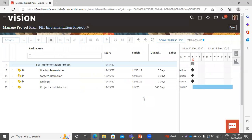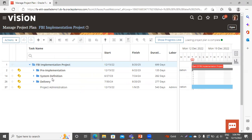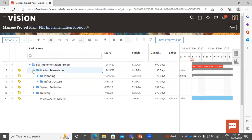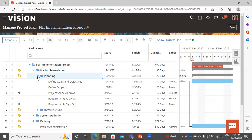It is taking time because it is creating the project. Now you can see the task pre-implementation, system definition, and delivery. I will expand it — these are the subtasks. Expanding Planning, you can see: Define Goals and Objective, Defined Scope, Project Scope, Approval, Requirement Analysis, and Requirement Sign Off. These tasks are coming from the template that we selected.